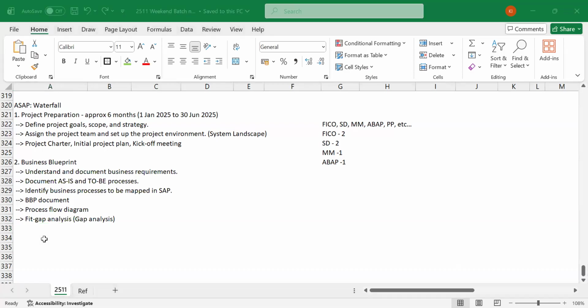Here, whatever can be delivered directly as it is in SAP, we'll say standard solution. Okay, fit to standard. That is called fit to standard, and you directly implement that. Whatever cannot be directly implemented, we'll call it gaps. Okay, here under fit gap, we'll also identify those gaps and we need to provide the solutions. How am I going to fill this gap? We'll talk about that all.